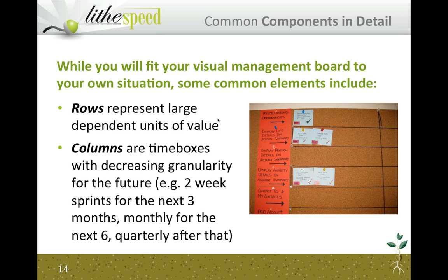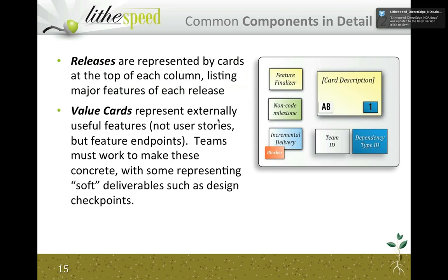And again, if we're dealing with things like waterfall teams, there may be specific deliverables that are already planned out for time periods such as that. But we don't want to give the impression that we have a lot of specificity available to us there. So we have increasingly vague time frames, increasingly broad and not very granular ones, as we proceed to the right of this board.